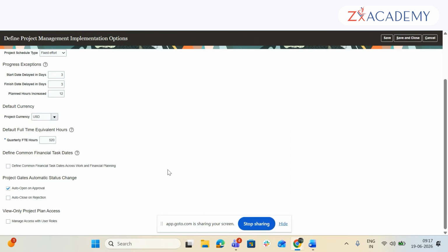Foundation is that important. So Oracle has given you the functionality of gates. You cannot open the gate unless you get all these deliverables. There are different statuses of gates. Once you open the gate, you can go to a further task. Further task means let's start creating the ground floor. We have got the green signal.